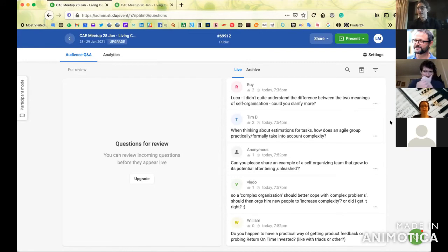So that's one practice. Then in the catalog, you find another practice that is on the same type of thinking. So estimating complexity using the cone of uncertainty, not really the cone of uncertainty, but an application of that concept. And the idea is similar to what Leith suggests, but this practice looks at 3 different sources of complexity. It looks at the domain and tells you which characteristics of the domain can make it more or less complex. It looks at the technology and the systems that are involved in the implementation. And then it looks at the people involved and the dynamic.